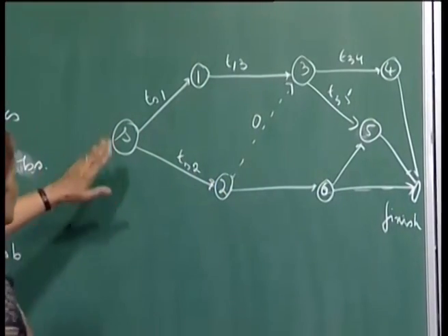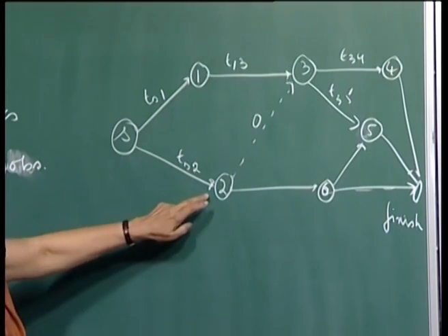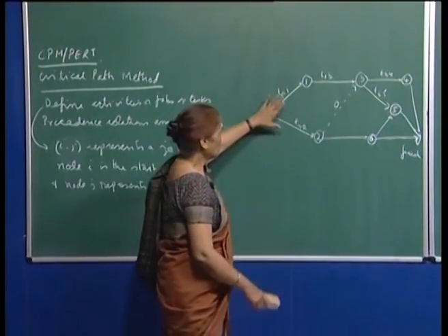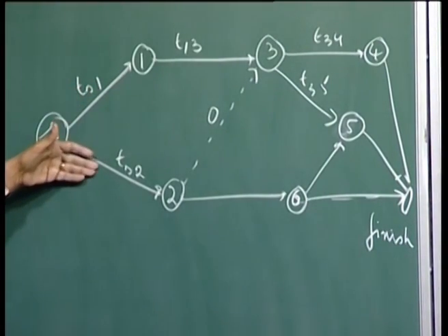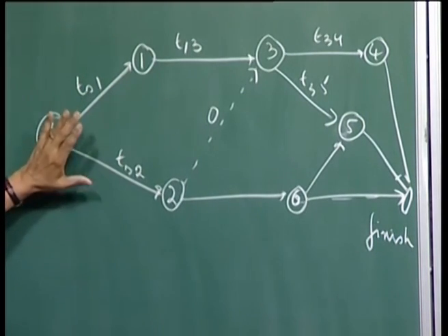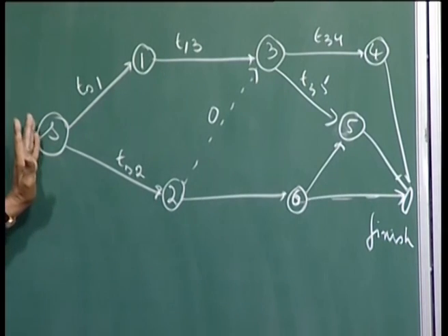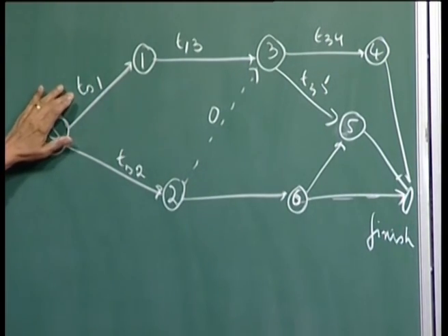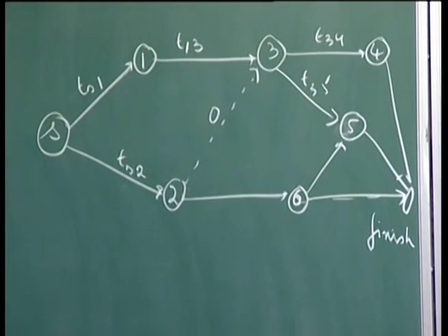So, here you start, and what it is saying is that activities S1 and S2 can begin at the same time, because the resources and the kind of team that you require for starting these two jobs, they are different, they are independent, and so you can begin the project from this point of time, and both these activities can start at the same time, right. Then TS1 gives you the time to complete this job. TS2 denotes the time to complete the job S2, right.